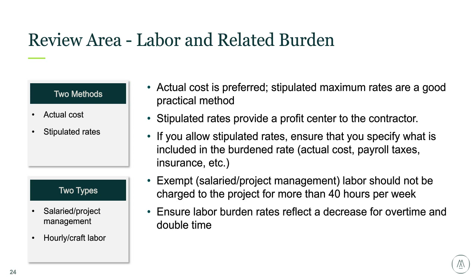So I'll repeat that. If you go the actual cost route, defining what actual means, and defining what's allowable and what's not allowable will save you a substantial amount of money and a lengthy negotiation potentially at the end. My preference is actual cost. As you know, if you know the true cost of each employee, they don't include profit. However, if you have stipulated rates, it can be practical as long as they're market competitive and don't include a lot of profit. Again, if there's no profit in labor, there's a higher likelihood that the labor charges to the job will be very efficient.